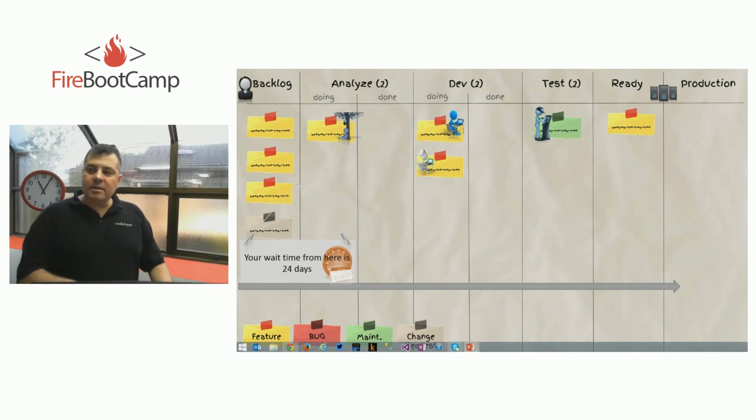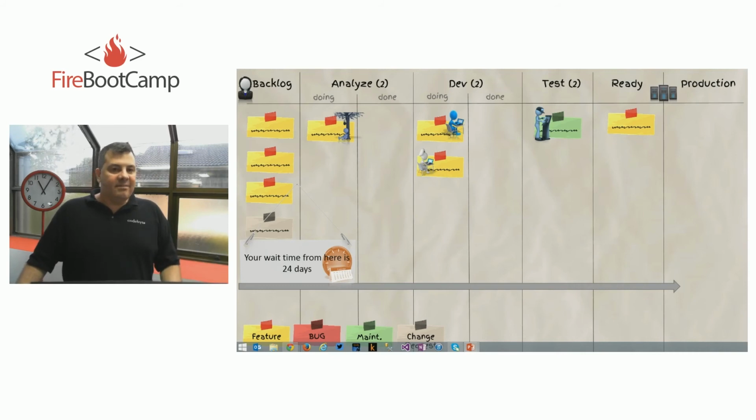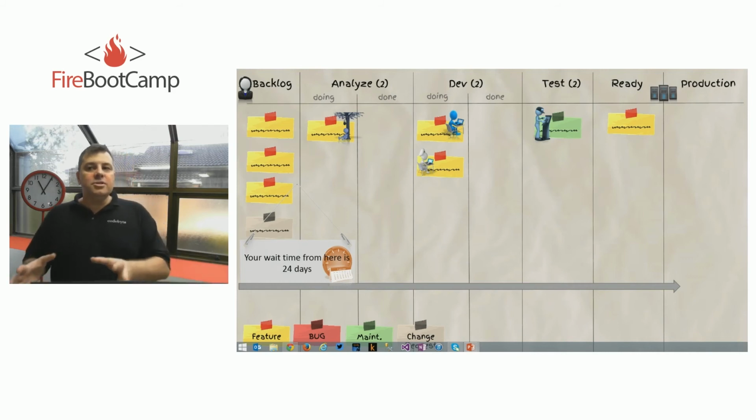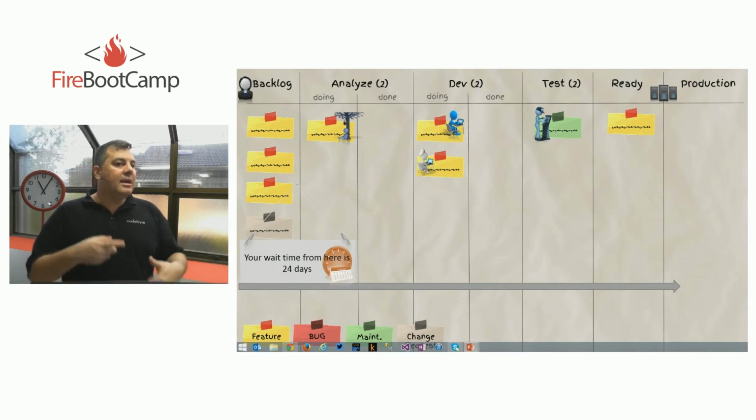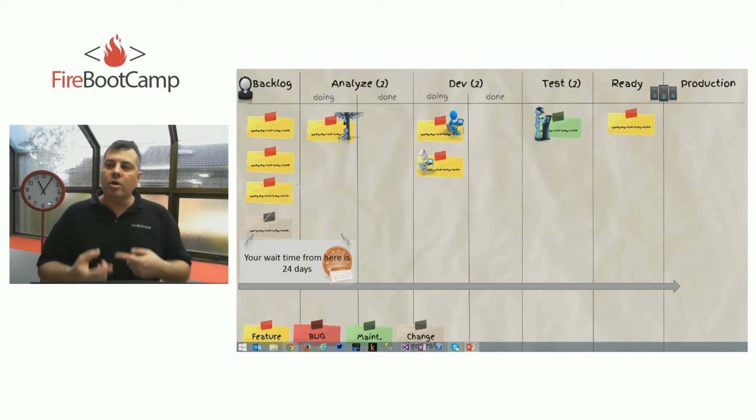And then you can go back to your team and say, okay, maybe this is too long, right? Hey, with this rate, if one item takes 24 days, we have 100 items, and let's say 2 developers, well, this is going to take 50 days. We only promised 35. Why is it taking too long? Again, this is all about going back and continuously trying to improve your process and how you work.